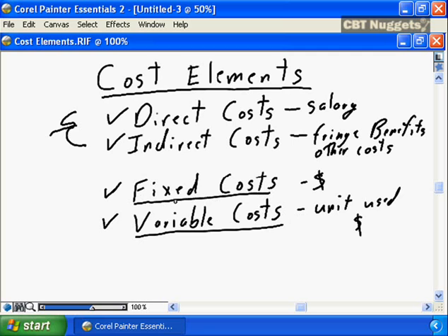The fixed costs are often harder to define, harder to find when developing your cost schedule for your project. You forget that you needed to buy the server. You forget that you needed to buy the piece of equipment, and it simply disappears into the infrastructure. You must ensure that all fixed costs specifically acquired and allocated to your project are included in the overall cost calculations for your project.